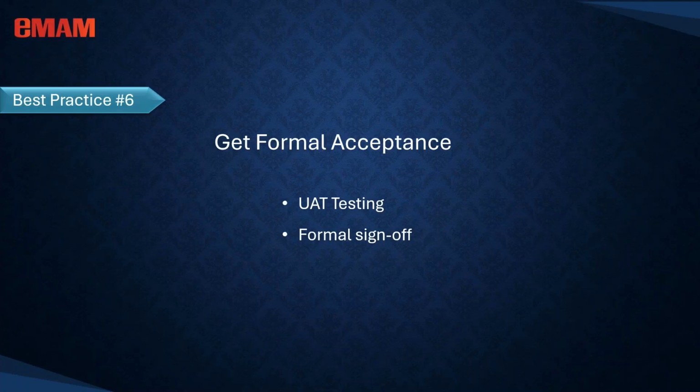Once the testing is complete, get a formal sign off from all the stakeholders that the project goals have been met and the deliverables meet the agreed criteria. You should actually never skip this step to save time because it is critical for accountability and project closure. Once this document is signed, we officially move from implementation to maintenance and support stage.